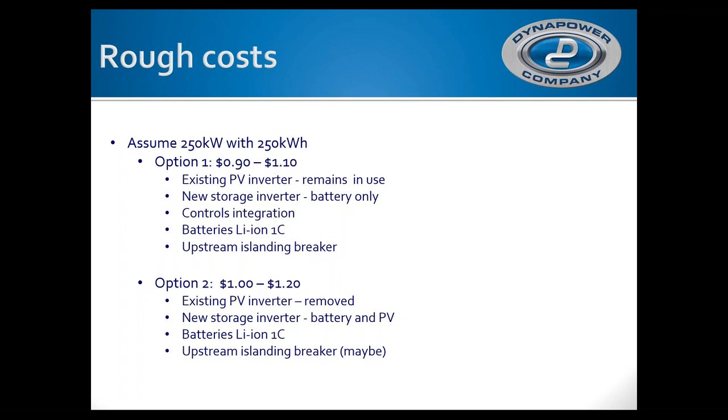Yeah, every project is unique in pricing, obviously, based on the complexities or retrofit that needs to be done. But we've done projects where, if you take out the $1 to $1.20 cost, you could be equaling that on the cost of interconnect agreements, construction costs, pad costs, project management, permitting, engineering. That's typically what we're seeing, equal cost to the battery storage and inverter.